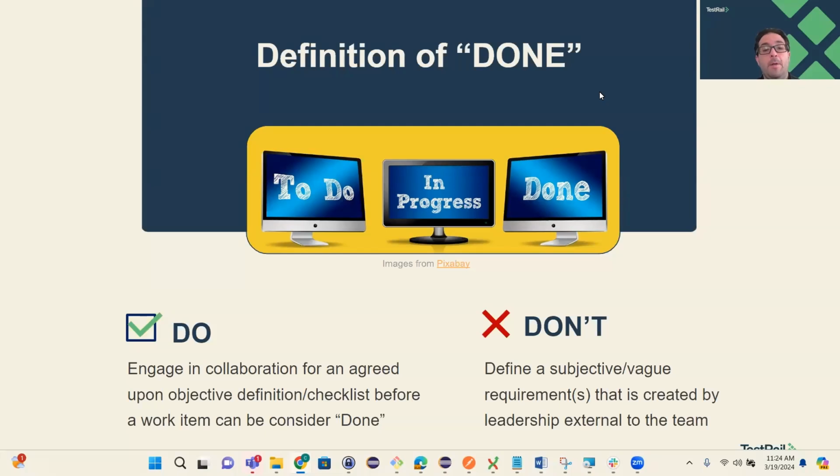On the teams I've been on, I like to think of it almost like a checklist. From a technical perspective, our CI pipeline is all green, all tests have been run, right? Unit, automation, integration, performance, whatever your team standards are or are applicable for that body of work, need to be passed. Maybe there are code reviews. We'll get into reviews in a little bit. And then maybe we have acceptance by end users, stakeholders, or the product team. Someone is actually accepting the body of work. That's a great way to check off what you should do for done. These are objective, measurable items.